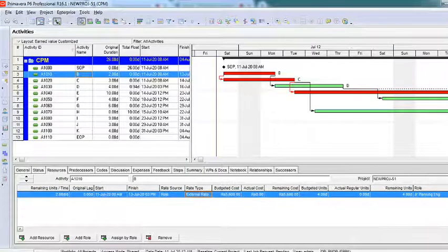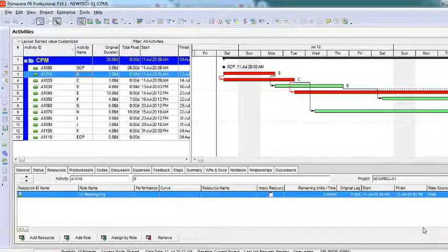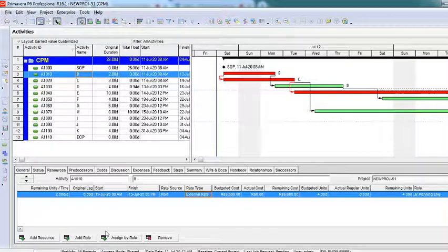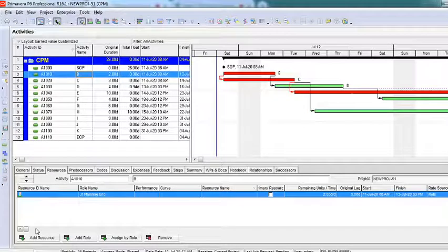Why this, why not that and all? Remaining units, we haven't done anything. Do not worry about why it is remaining, why this is 0 in actuals, because everything is remaining. Nothing is done. We are just doing planning. Once the execution starts, then the actuals start applying. When you start the execution of your project onto the site, I'll start updating what is happening on the site. That's where the actuals will come. Right now everything is remaining because actuals are not there. Everything is just in planning currently. Right? Understood? You want me to create one more and show?